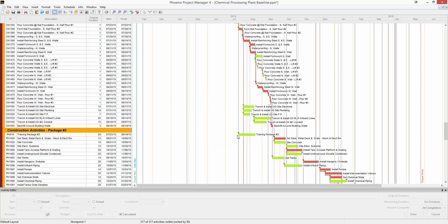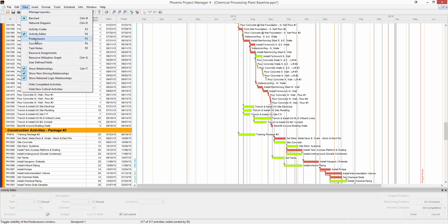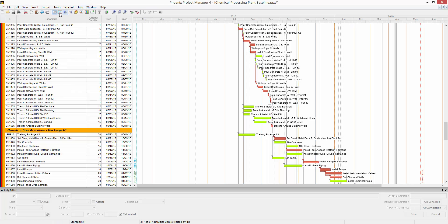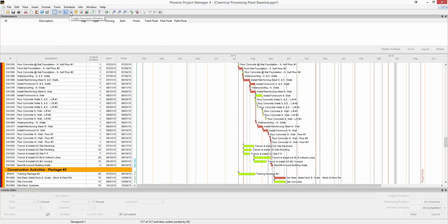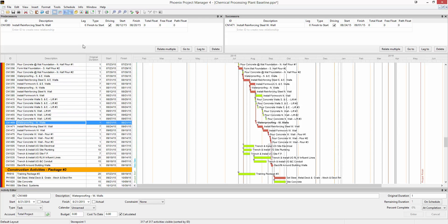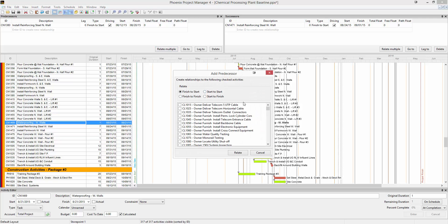Another way to view a relationship is by going to View and then clicking on predecessor or successor. This will pull up the predecessor and successor windows — these two buttons here will do the same thing. If I click on an activity, I can see its specific predecessor and successor detail information. I can change lag, type, and add or delete relationships in here. There's also a relate multiple button, which pulls up that familiar window that allows you to relate multiple activities at once.